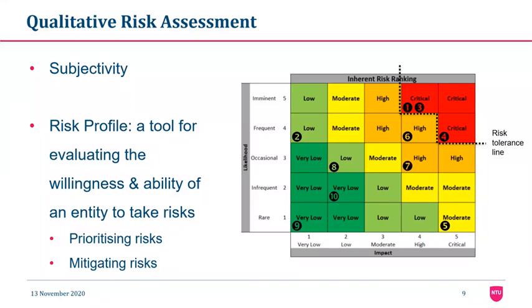We can use a risk profile, which is a very simple tool to represent risks and how they relate to each other. In this profile, each risk or event identified is ranked on a scale to determine the likelihood that the event will take place and the impact or potential damage that would occur if that risk happened.